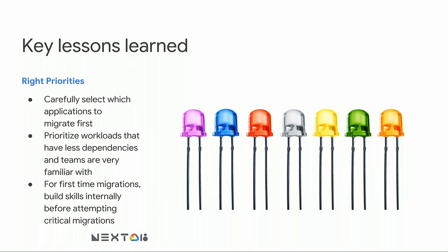Analytical workloads are typically one of those workloads that you can prioritize to move to the cloud, because with them you can learn a lot from moving these types of applications to the cloud, and see what lessons learned and what skills you have in place so that you can adjust for the next mission critical migrations as part of the process.